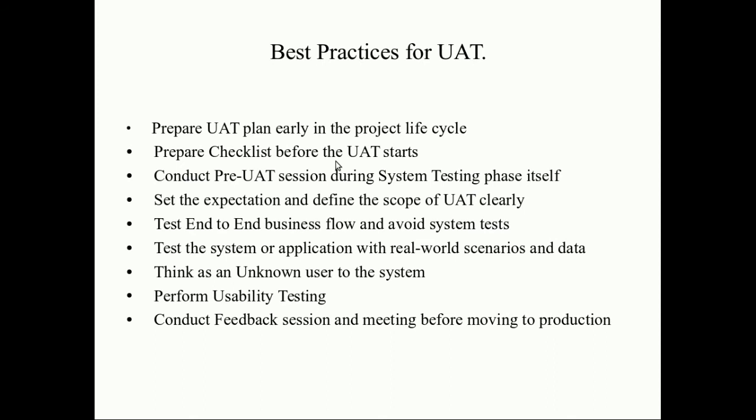The second one: prepare a checklist before UAT starts. So we should prepare a checklist for each and every task before user acceptance testing starts. We should conduct a pre-UAT session during the system testing phase itself. So we should conduct this kind of testing before moving to the actual testing. We should set the expectations and the defined scope of UAT clearly. So we should do this in advance, before starting the testing.